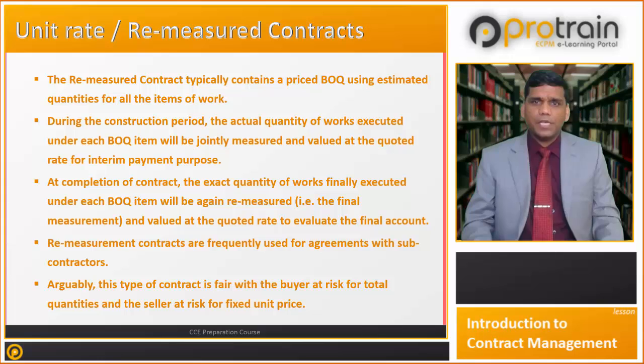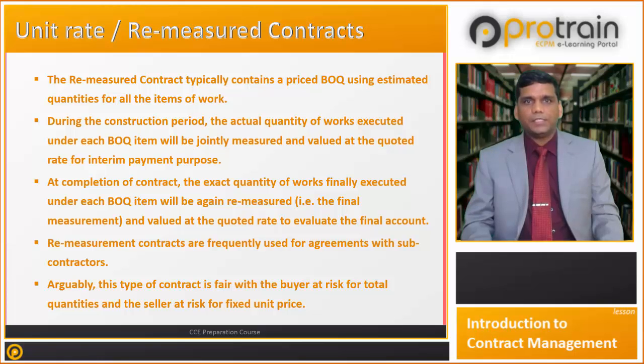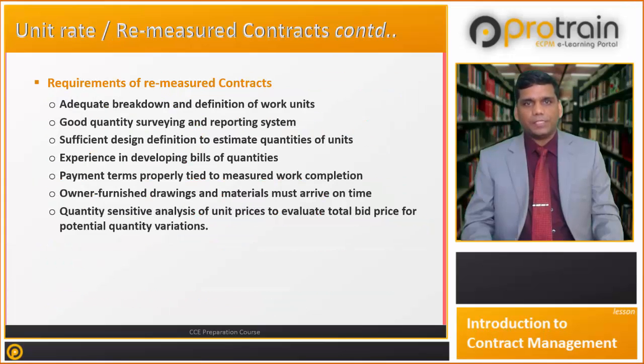Remeasurement contracts are frequently used for agreements with subcontractors. Arguably, this type of contract is fair, with the buyer at risk for total quantities and the seller at risk for fixed unit price. Now let us see the requirements of remeasured contracts.